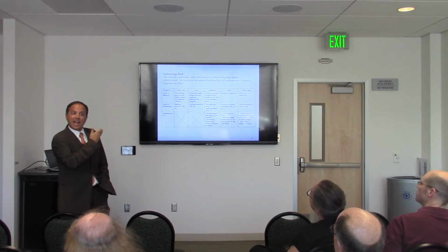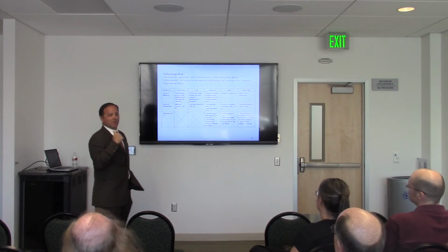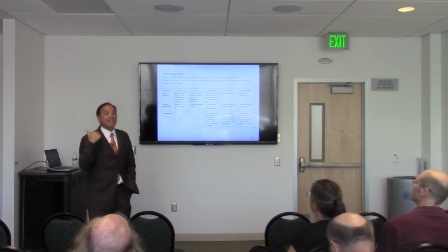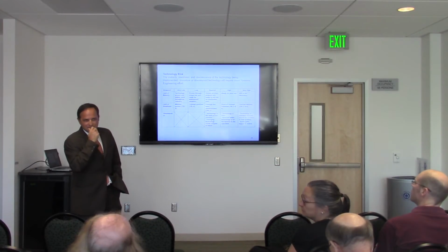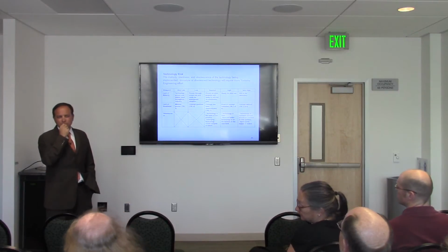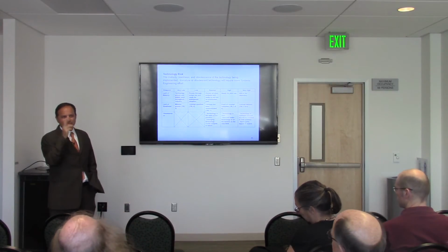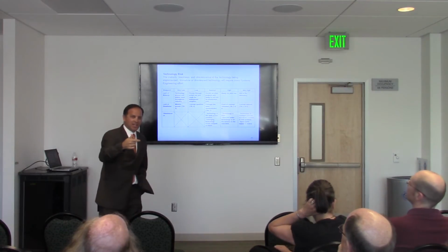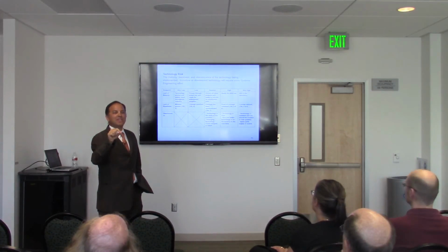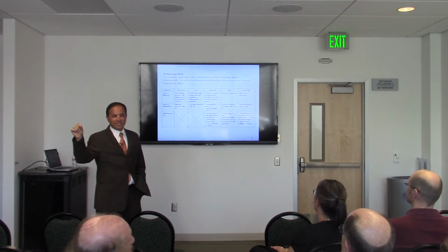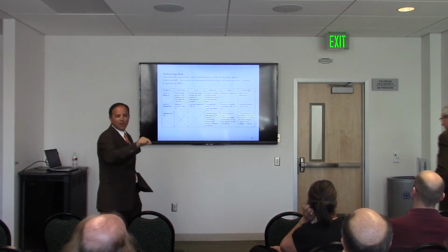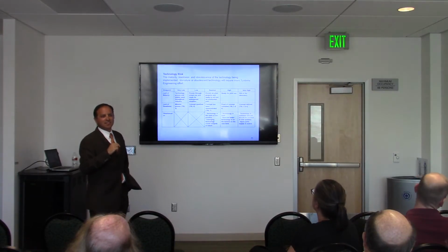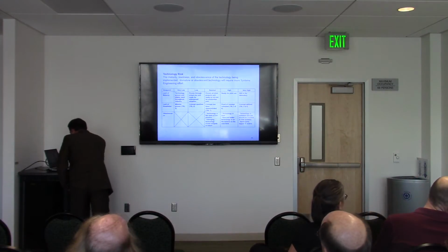That's the other constraint that I have. I can create phenomena and parameters just on the back of a napkin, right? But can I get data to validate that it belongs on this list? You're asking the project manager what was the TRL of some core technology in that project. That's right. And actually, the question is more specifically, what was the TRL at the beginning of the project? Because I don't want to know what it was at the end. I want to know what it was at the beginning, because that's where you have to invest the person months. All right. Let me keep going here.